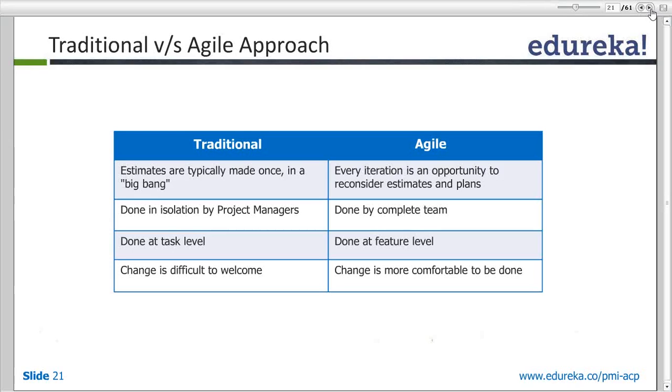Is there any time when I would go for idle time and not the story point? After you have the complexity defined, when you know the sizes, probably you would not be able to do it in your first iteration, but once you are 2, 3 iterations old, you would be able to do it, because by then you would have an idea. Generally something which I estimate for 2 story points generally takes 4 hours, right? So based on that you would start defining your hours, but in the first few iterations you would not be able to do that.